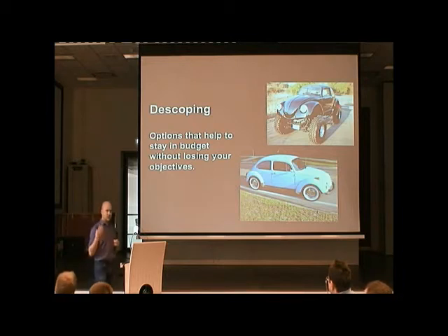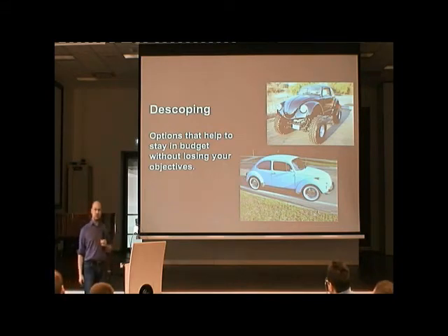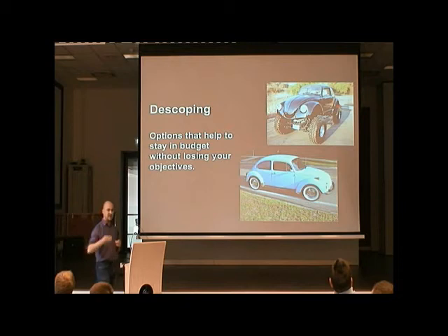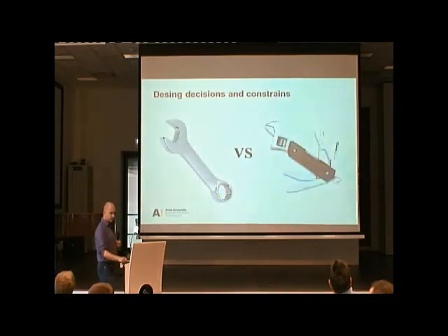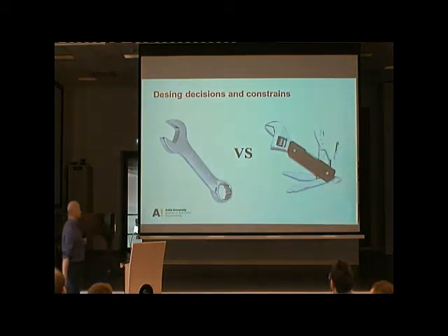However, you start to apply for money for your mission. And they say, okay, 2 billion, too big. 1.5 we can manage. And then you have to descope your mission. You have to identify the most important requirements and objectives, and descope the other parts. It might be a nice car to have like this, but maybe it's more expensive and you just have to go with a normal one. These are decisions you have to make all the time.